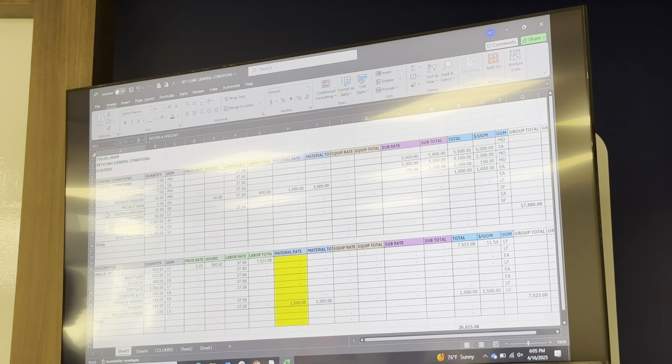Project data, let's call it data. We've switched to Starlink satellites. You'd be surprised how hard it is to get temporary data out to a job site. AT&T really won't bring it out there if you tell them it's only going to be a temporary connection. So Starlink's been great. So the quantity is duration, in months, and let's go 200 a month.